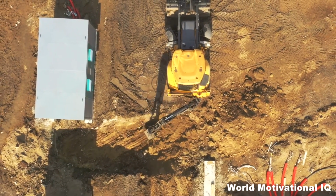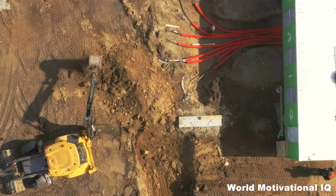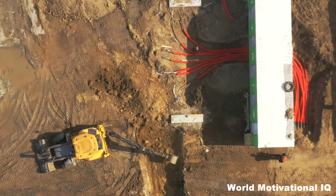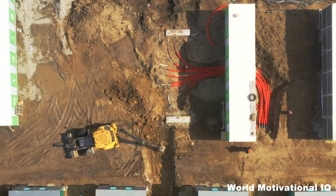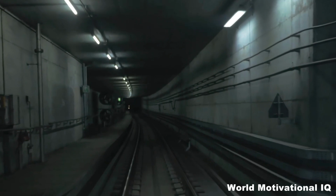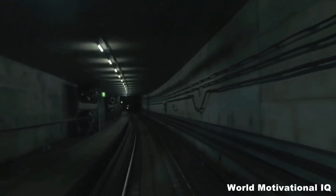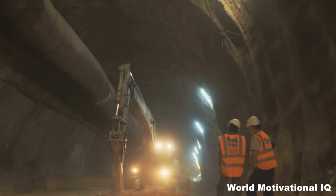The soft, waterlogged ground made for perilous working conditions, and workers had to dig through the earth using a pioneering shield technique that Brunel himself invented. Several floods and a high financial cost led to numerous work stoppages, making the project a 20-year endeavor. Despite these hurdles, the Thames Tunnel was a resounding success, serving as a pedestrian walkway and later as a railway tunnel. It was a marvel of Victorian engineering and a testament to human resilience and ingenuity.